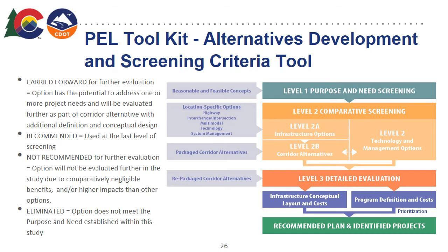In fact, we've had a few instances of lessons learned when it comes to screening too far. There have been times when we would get down to 1 or 2 alternatives left on the table, and then NEPA didn't happen for a while. Then once the NEPA phase began, some players and politics had changed, some technology had changed, and we ended up going back and reanalyzing alternatives that were eliminated or not recommended as part of the PEL. Now, if construction funding is imminent, it might be worth the effort to do detailed screening. Otherwise, it's best to have several viable alternatives left on the table.